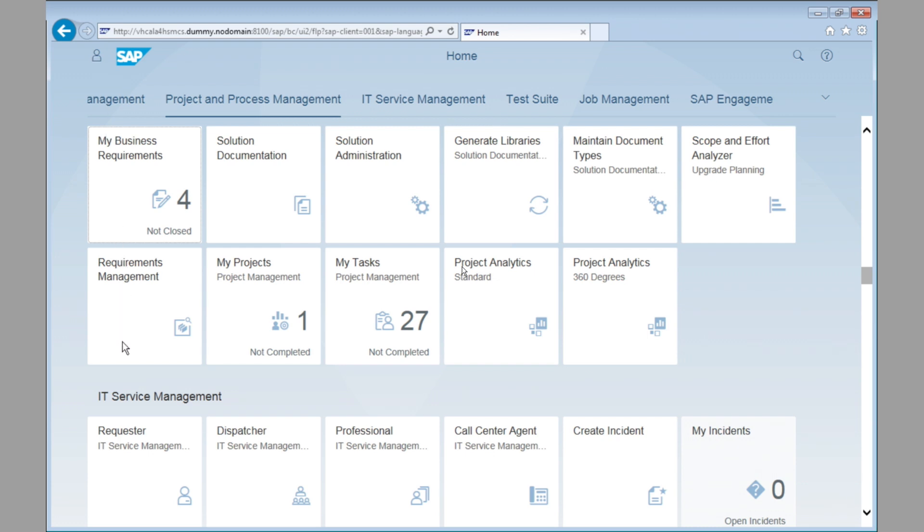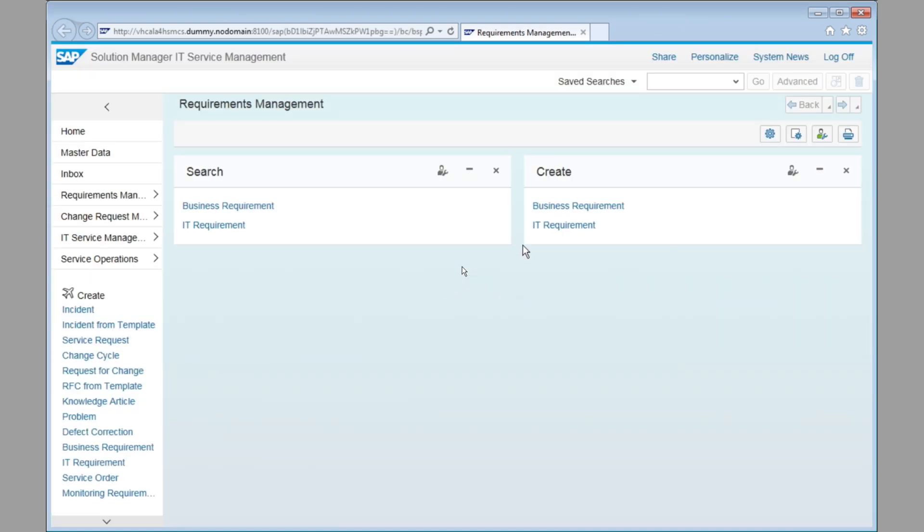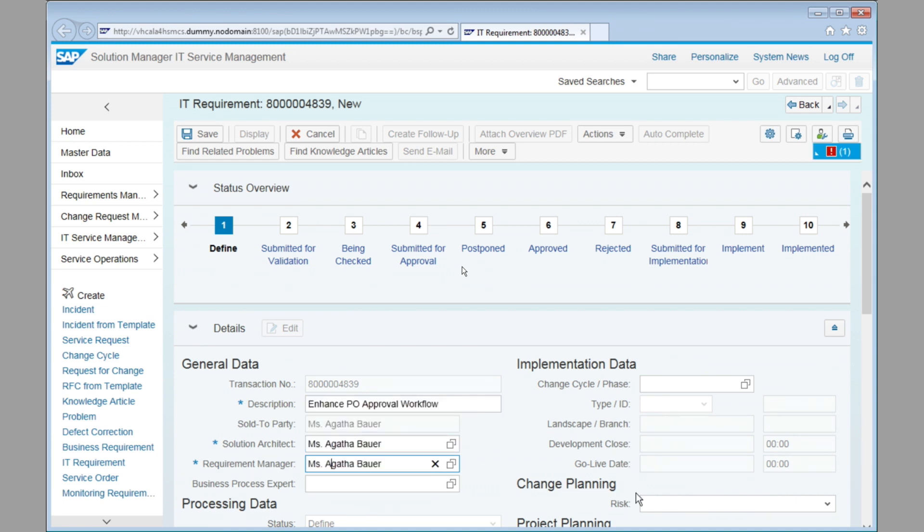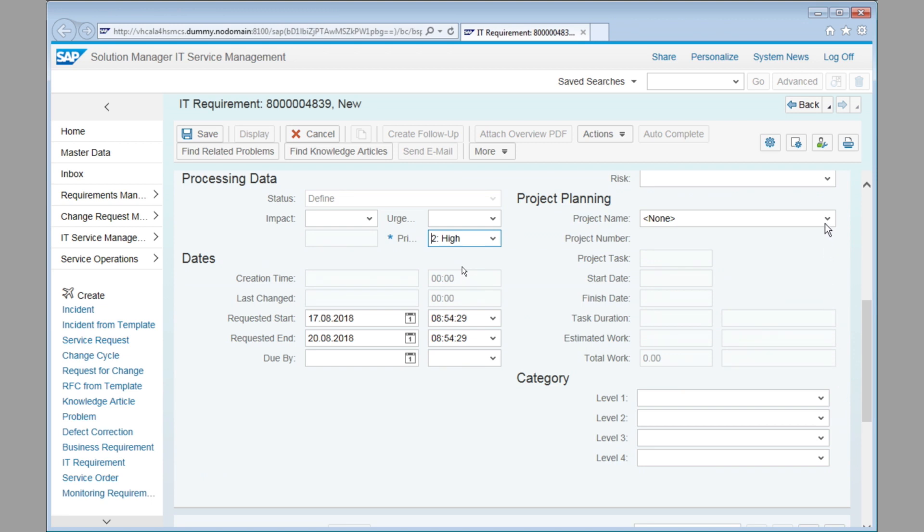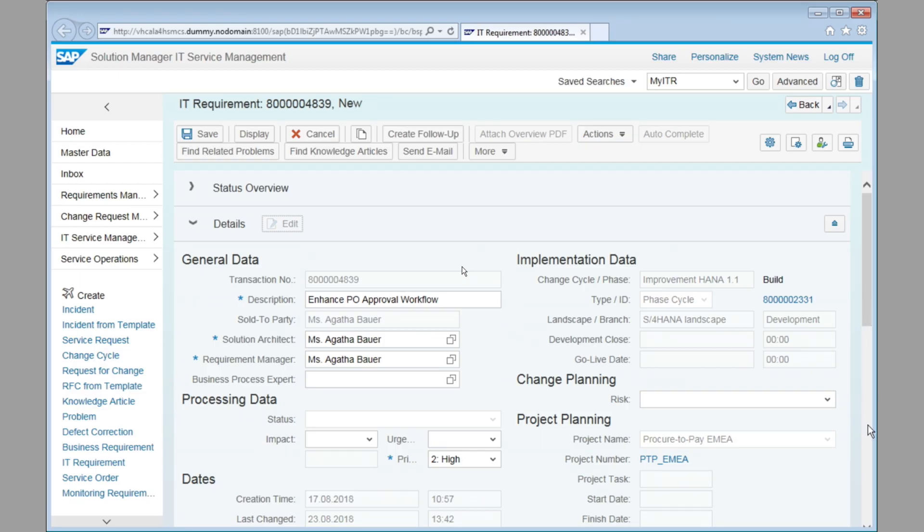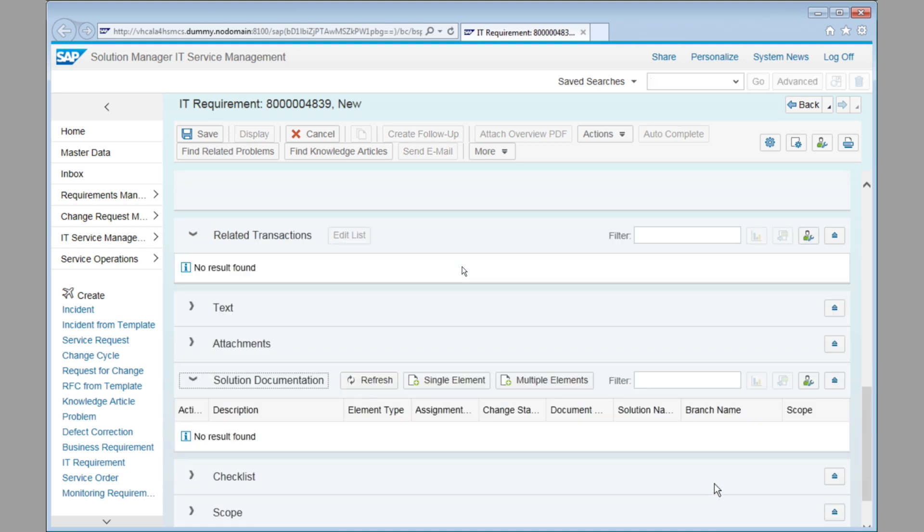Now let's take a look at the requirements. When we go ahead and we document an IT requirement, for example, so here we have the IT requirement, we enter a description, sold to party, owners, and so forth. And then we go ahead and we assign a project to the IT requirement. Of course, in this case, it will be our procure to pay project EMEA that we select. By selecting this project, you see at the top now that automatically the right change cycle is assigned and that also the landscape is assigned for the project. So all of this information comes into our IT requirement automatically. So no need to do any of this manually.